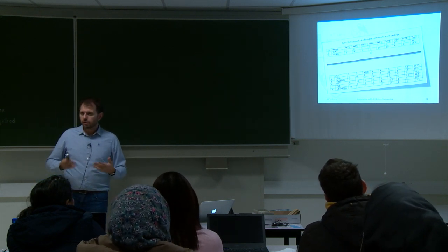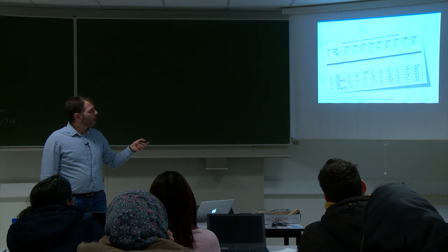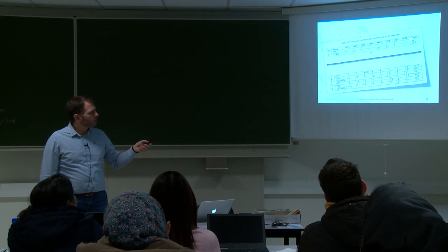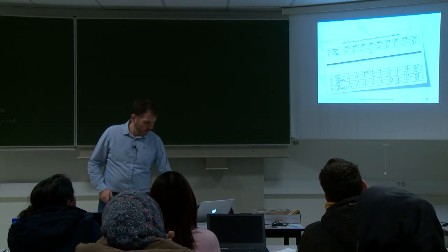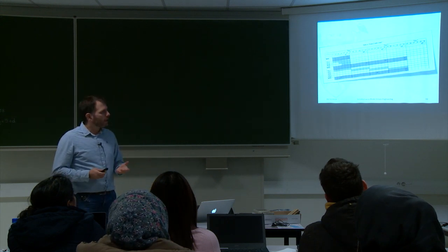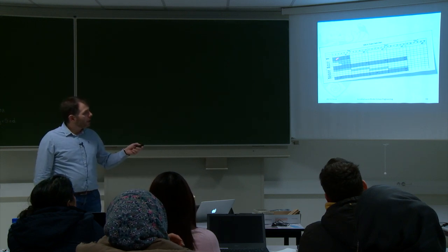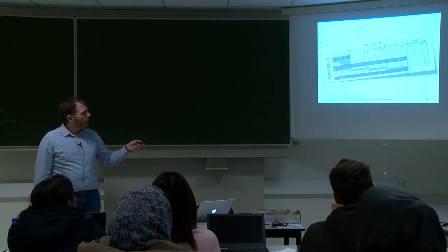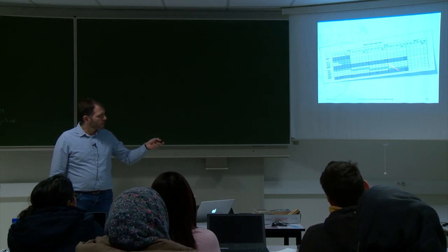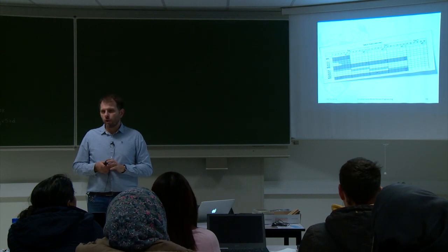Then we have another table, and these are all parts of the template, so they are compulsory. We're not masochists, we're not creating them just to make our life harder. Here we have another table where we have all the different partners and how much they contribute to the different work packages, and the totals for every partner. And then we have a Gantt chart. And these are only a few of the tables that we need to include in the proposal. In the Gantt chart, we have the duration of each work package and the duration of each task in the work package, and the deliverables and their delivery dates, and so on and so forth, and also the different milestones of the project.